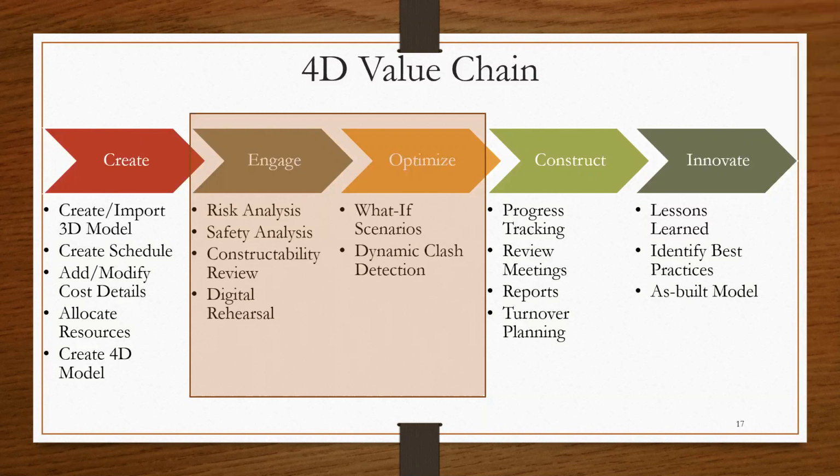The next stage is the construct stage. It's at this stage that with your optimized 4D model, which you probably have saved as your baseline, you begin to do your progress tracking. You begin to facilitate your review meetings with your live models. You begin to develop your reports and start at this stage to do some turnover planning.